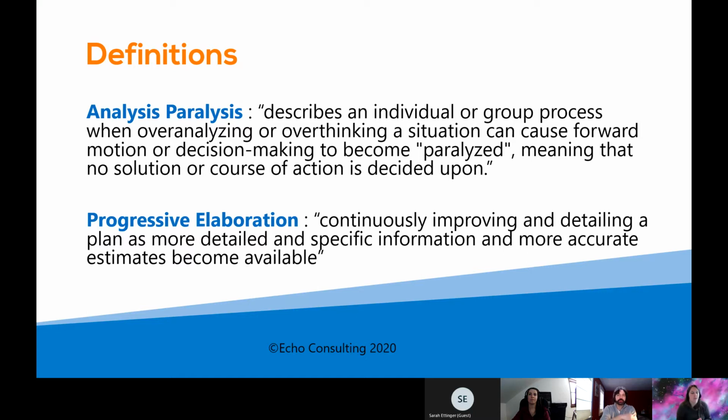And so one of the important points that I try to drive home with my teams is about progressive elaboration. As you have new information, you update the estimates that you have. As more information comes in and it's more specific, you become more accurate. So I will even go out on a limb and say, for the very start, when I'm first ranking a variety of different projects or goals or tasks, I start with a target of 50% accuracy. And when I say 50% accuracy, what I'm really meaning is that I'm adding some buffer on either side, and we'll talk about some of those strategies in a little bit.